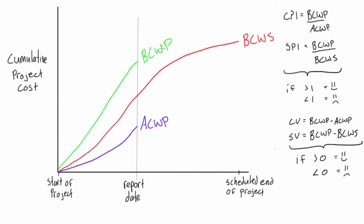The point of this video is how to interpret an earned value graph visually. BCWP, ACWP, and BCWS can all appear in different orientations. Importantly, the only line that can extend to the very scheduled end of the project is BCWS — the budgeted cost of work scheduled — because you can predict how much it's going to cost. You don't know anything about the work actually being performed until you have a field report, so BCWP and ACWP cannot go beyond the reporting date.